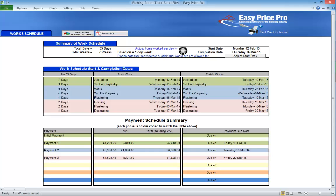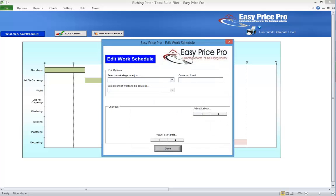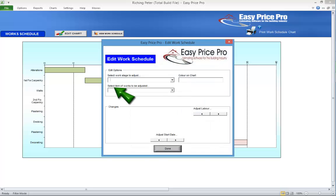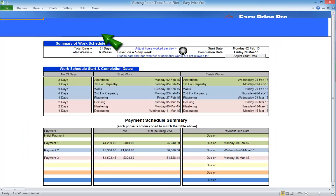You can edit the work schedule. If you click View Work Schedule Chart and click the Edit button, you can change the start date for the work sections and increase or decrease the trades who will be carrying it out.